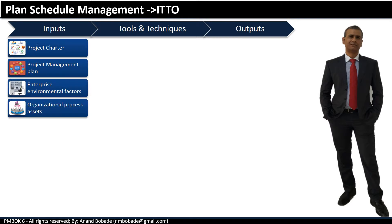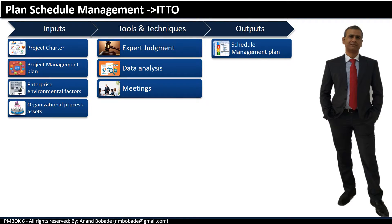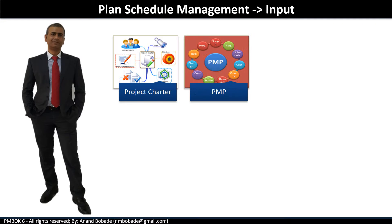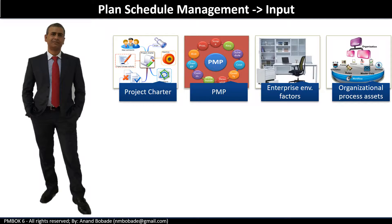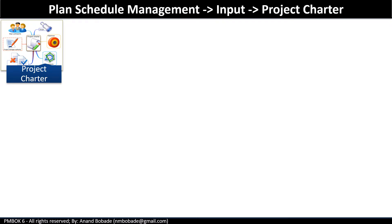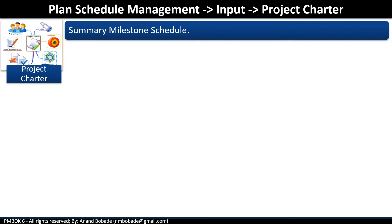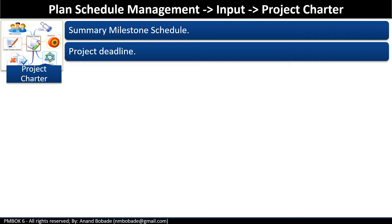Let's look at inputs, tools, techniques, and output. The inputs are: project charter, project management plan, enterprise environmental factors, and organizational process assets. The project charter contains many key elements at a high level — for example, major constraints of scope, schedule, and cost. With respect to schedule, the project sponsor might have specified important milestone dates in a summary milestone schedule. It also includes the project deadline for completion, and this constraint will be kept in mind while creating the schedule management plan.